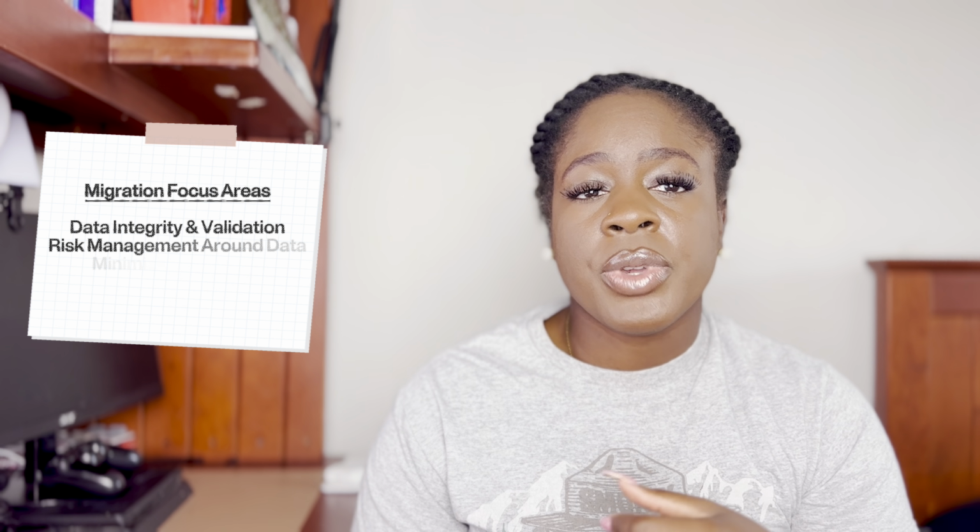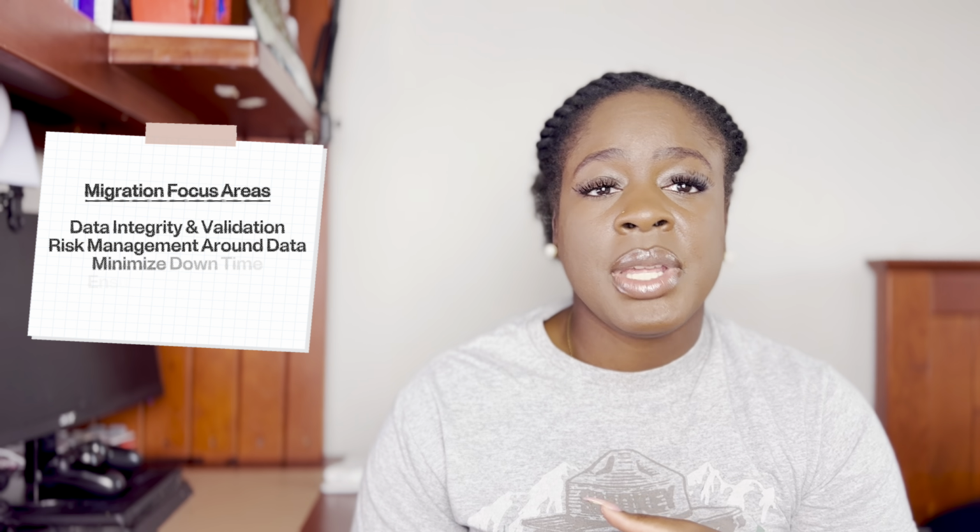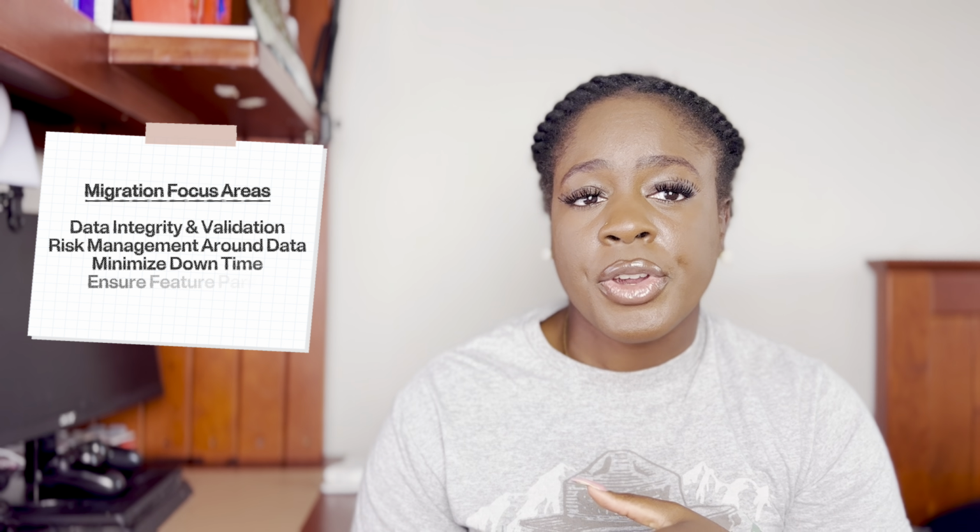Whereas something very small and simple like, hey, create this little form so we can send out this survey and get some feedback from these customers. Now, as a project manager, you do have some focus areas in these two types of projects. So when we're looking at migration projects, as the PM, you are responsible for the data integrity and validation, risk management around data loss, minimizing downtime during cutover, and ensuring feature parity or improvements.